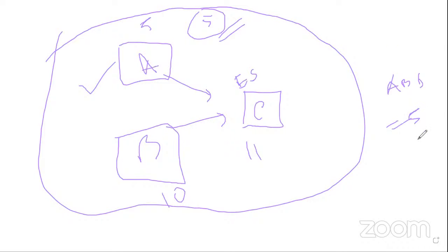For the critical path, we don't have any float. It is always 0 or negative. That is very important to know, because a critical task can also have negative float, not only 0. You should remember that because in PMBOK that is mentioned specifically. So in the exam, you can get some options. Critical task is always 0, that is true, but negative can also be the critical path.